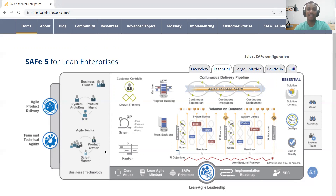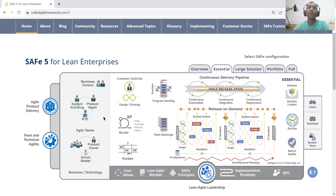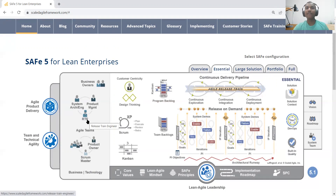The composition and definition of Agile Release Train is multiple agile teams coming together and working together. The main intention is that all the teams should be working on one common solution, one common implementation, or one common product backlog. Once we have the agile teams, we will be having some additional roles identified at the release train level. The RTE — Release Train Engineer — acts as a chief scrum master for the release train. His responsibilities include facilitating, coordinating, mentoring, coaching, training, and making sure the release train is progressing as per the plan.